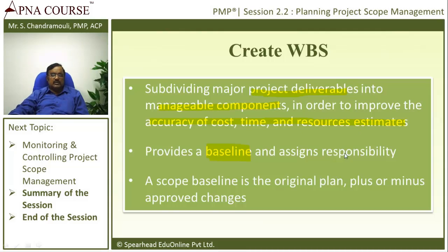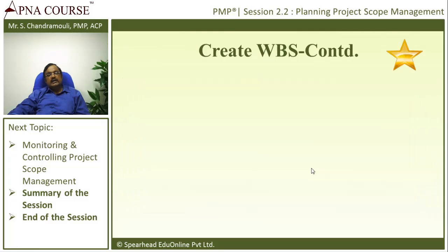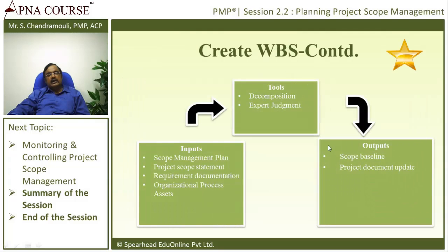A scope baseline is the original plan plus or minus approved changes. Original plan plus or minus, another PMP exam point to be taken. A scope baseline is the original plan plus or minus approved changes. Scope baseline is created in the Create WBS process. So what is the output of Create WBS? Scope baseline, and any other project related documents are getting updated.